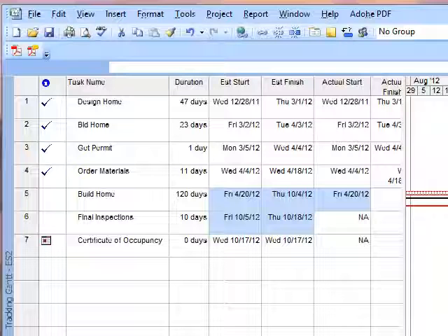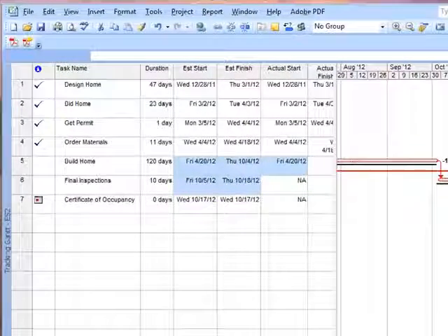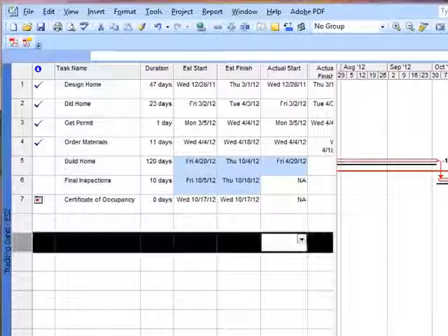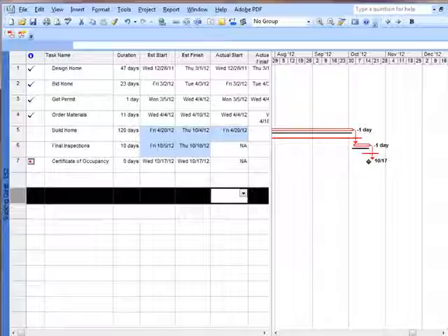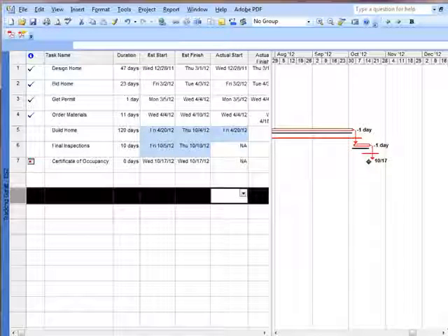And that allows you to find out what's going on, because often it becomes a problem with your logic, and so what you do is you just change your logic, or you might have to break it up, meaning you can have one activity that really should be 2 different activities, and it's giving you a false report. Or you may find that you need to do something earlier in order to make up time.